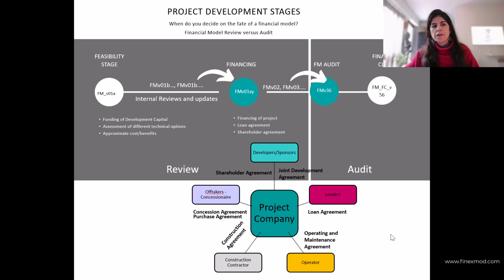So if not, this is the early stage when the model is still in the hands of sponsors and developers. Then as you proceed with the evaluation of the project, you will need to go and see the co-sponsor, and they will also review the model. You will need to send it to lenders, and they will do different rounds of review. And hopefully throughout these different rounds of review, if there are any mechanical errors in the model, they will be captured.